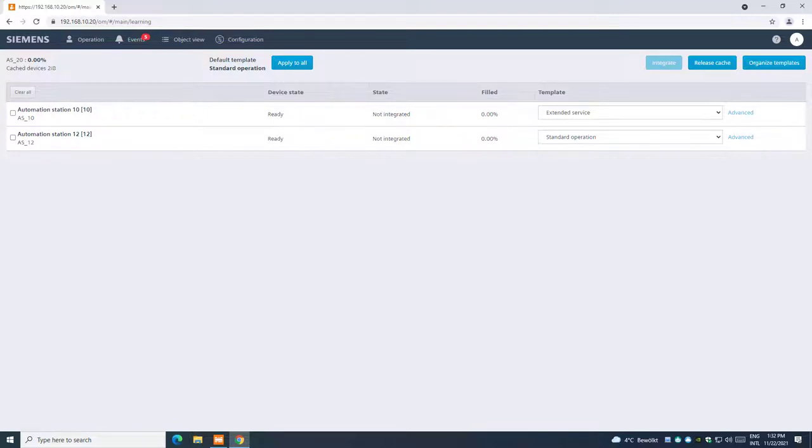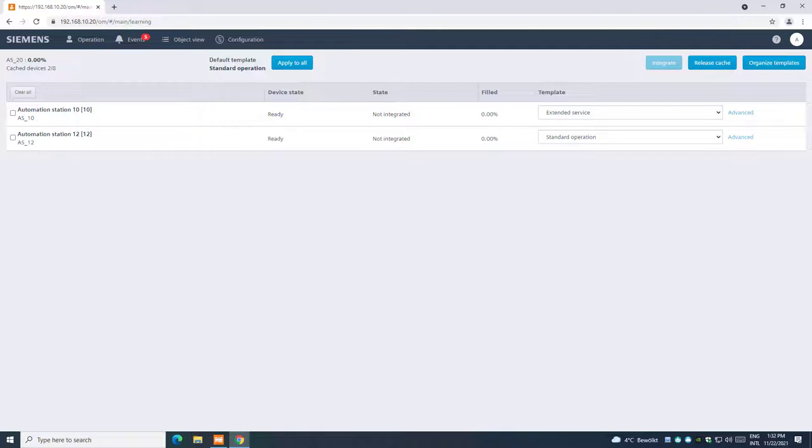Due to the fact the cache of the device depends on the number of the BACnet objects, the cache operation can take several minutes, which can be a bit annoying for the commissioning phases. For that reason, an option to configure the automatic memory release with a configurable timeout is available to fit the engineering and commissioning needs. We will see this option afterward, once the integration dialog will be closed.